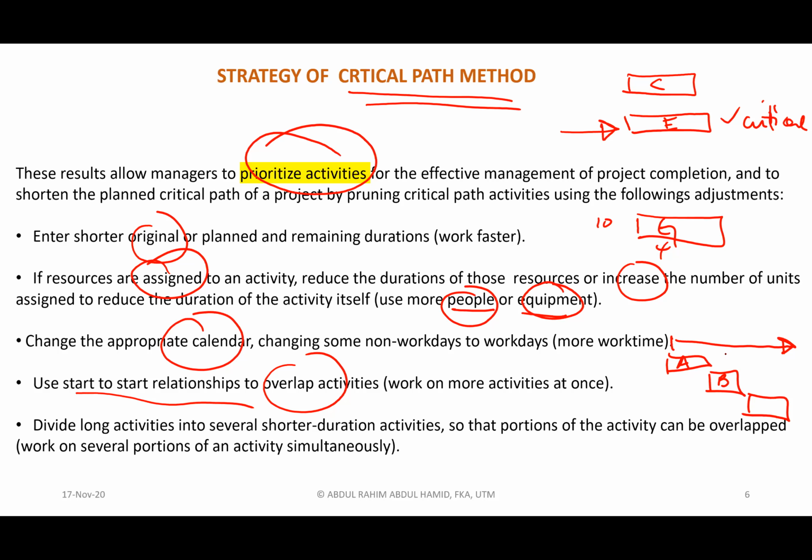But you have to remember, when you start two activities concurrently, meaning those activities cannot use the same resources. You must have some kind of team A and team B. Well, what to do? Because now you are running late on time, you cannot simply use the same resources for both activities. Now you have to split, okay?